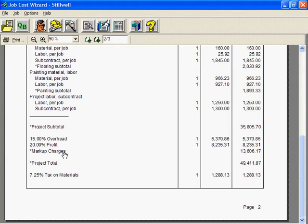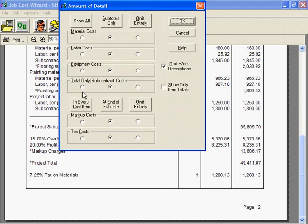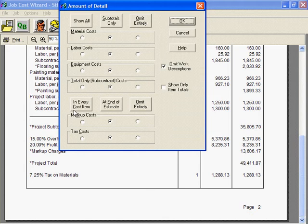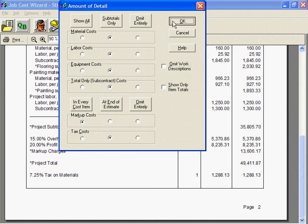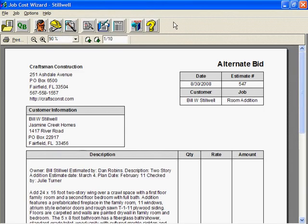Markup has to be in your estimate, but it doesn't have to show up on your bid or invoice. Job Cost Wizard lets you distribute markup proportionately among all costs so customers never see markup as a separate item. You have three choices: Omit Entirely strips all markup out of your estimate — use this if you're exporting to QuickBooks and want a different markup for every item. At End of Estimate puts overhead and profit lines just above the total. In Every Cost Item loads every cost with a share of the markup. Now markup is hidden, and whether markup is hidden or displayed, the total is the same.